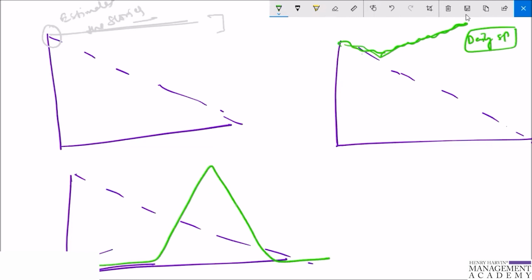So the team has not started correctly because here nothing happened. Then they added something here to the stories, and then they immediately burned those stories. They missed the planning and were very late to add the work hours on the tool. The team should be careful about capacity estimation, and planning should happen before the sprint, not in the middle of it. In such a case, it is suggested to restart the sprint, even with a shorter time frame.